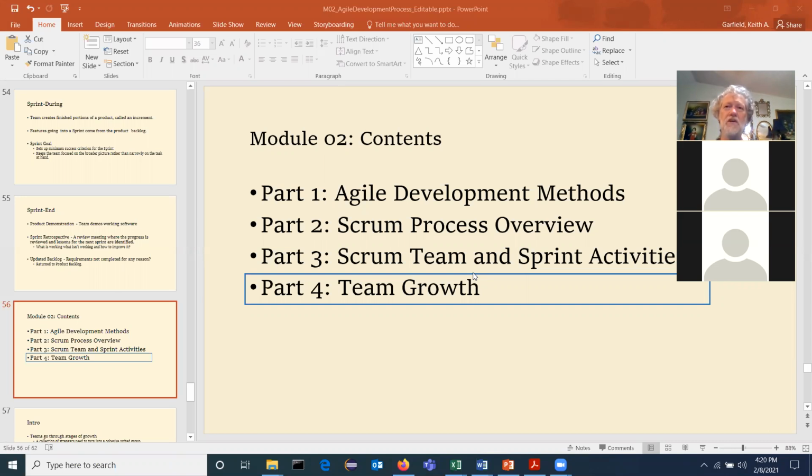Same thing with a sprint. You say, okay, we're going to pull these 5 user stories into the sprint. And what happens if one of them didn't get done? Do you extend the sprint to finish it? Absolutely not. This is about time management. So you stop the sprint. The one that didn't get done gets thrown back into the backlog. And if it got halfway done, you create another user story that says, basically, finishing up that half.